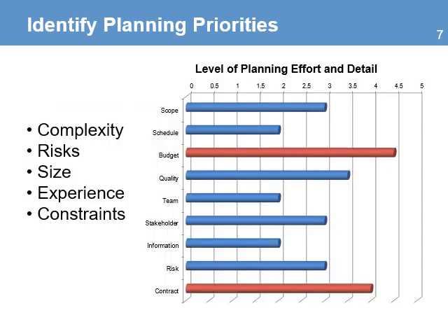In the example, we see that the budget and the contract management plans will need more effort and detail than the other plans. One of the reasons could be that the donor has strict policies on budget management, that there are more risks that will impact the budget, and that this is a complex and dynamic economic environment with high currency fluctuations, which is why you need to put more effort and time to develop these plans.